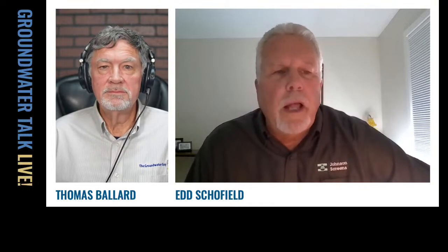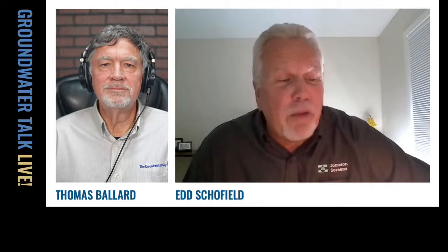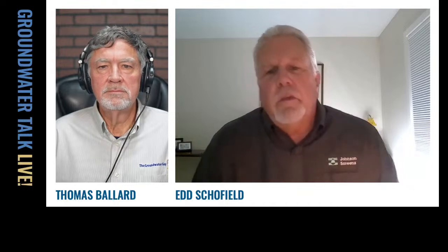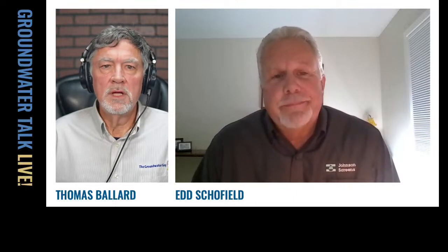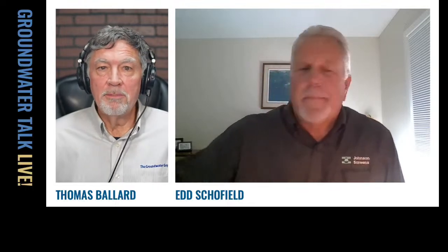Even if you're going back into a well that you didn't drill, that you're just rehabbing, video it before you get into it, because that way at least you've got your baseline as to the conditions and the circumstances that you're addressing, to make sure you cover yourself. This is a litigious society. You want to make sure that you've covered yourself. Yeah, and I always recommend video before and after, and it protects the contractor too, so they can't have claims coming back on them when you've got the video evidence that it's been done right. So the customer, the contractor, the pump installer, it covers everybody, and it just gives everybody a baseline and an understanding of where we are.